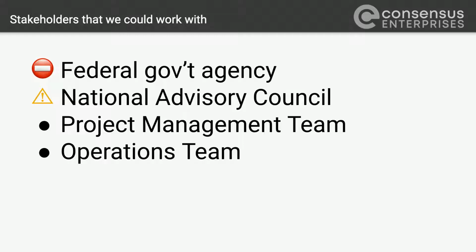So that was unfortunate. The project management team themselves were incredibly busy just working the politics of all of this, right? It took about 6 months, for example, to come up with a logo design. And then the logo design was central to a lot of the theming. So there were these extended delays on some of these things, and the project management team had their hands full just trying to wrangle that, right?